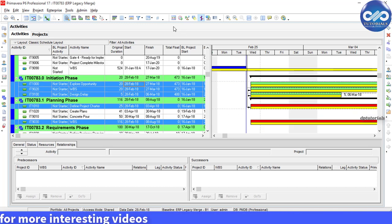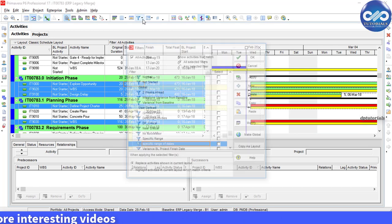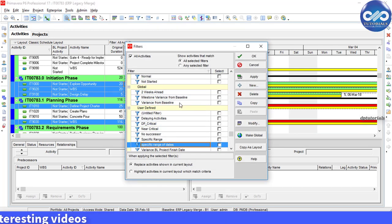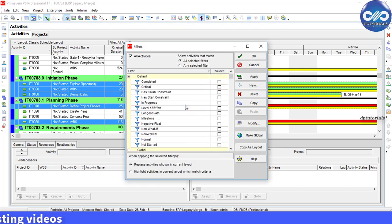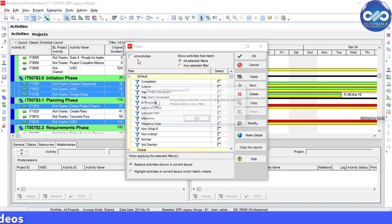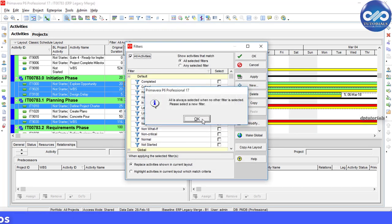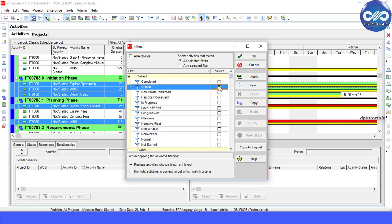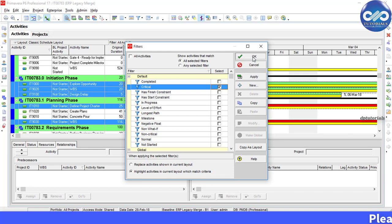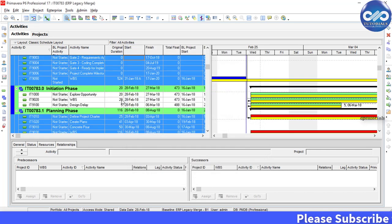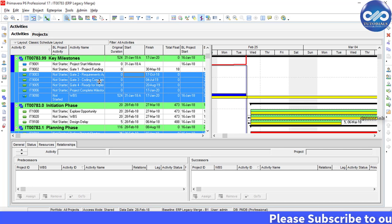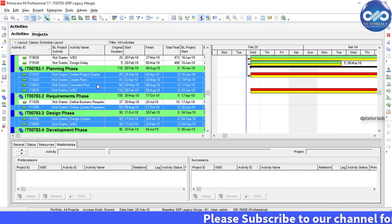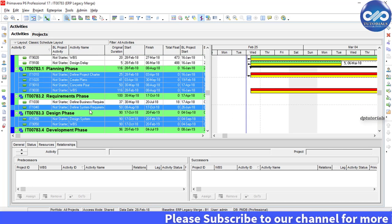We can also use the default filters to highlight activities. As an example, select the critical filter and again select the highlight activities in current layout which match criteria feature at the bottom of the filters dialog box. The resulting activities will be displayed like this, highlighting in blue color.